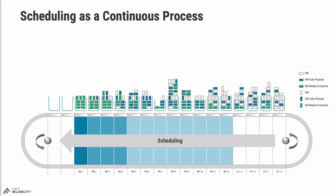Looking at the current frozen week, you'll see that there are only green blocks in that bucket — only ready-to-execute work — and the bucket is neatly filled to the top, meaning we are utilizing our available labor capacity. In the following draft weeks — the next three weeks — next week is neatly filled and mostly green, with just one blue block, meaning it's fully planned but the planner has not yet confirmed that materials are available and therefore hasn't marked that work order as ready to execute.